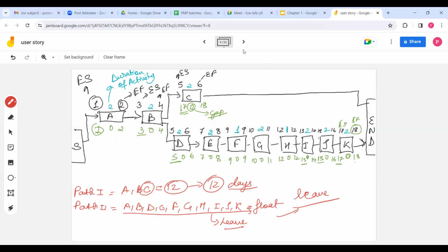In the interview, they mostly ask how you would manage activities on the critical path. You can say that on the critical path there is zero float and no gap between the activities. So what I do is keep my best resources on the critical path, and I always plan a backup. Let's say you said you will not give leave, but if someone is sick, what will you do? So you have to think of a backup resource on these activities.